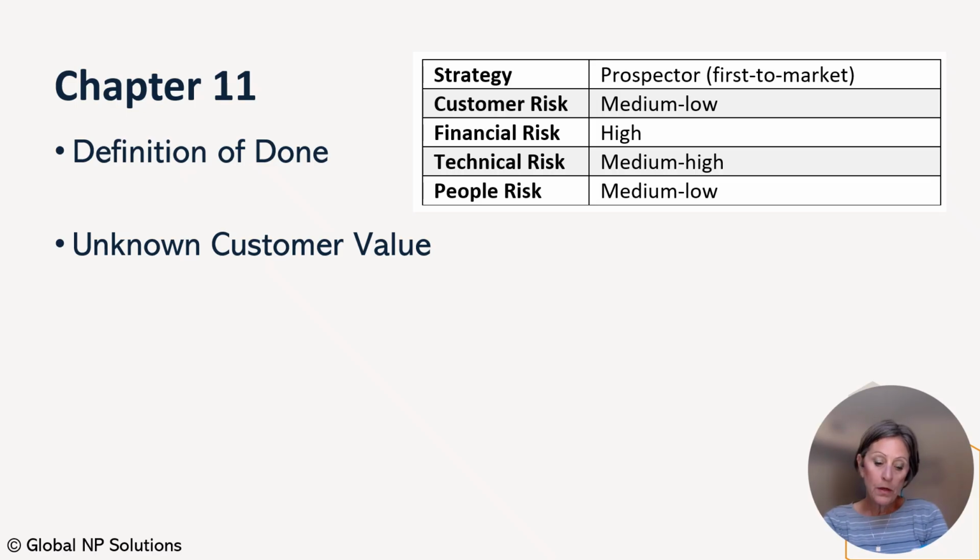For instance, when we first began working with a digital retailer, they had no idea of the value of their customer-facing internet products. Product owners created features based on inputs from engineering when they acquired new software tools. Working with the marketing manager, Scrum Masters began to assess the number of new customers and number of orders as part of each retrospective. These metrics demonstrated value delivery and were a good proxy for new revenue.